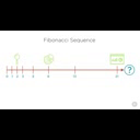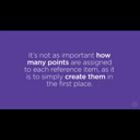For complexity points to work as an estimation scheme, each team needs to have the freedom to select reference items that make sense to them and to accept that those reference items will start to shift over time. The important takeaway here is not to get too hung up on how many complexity points to initially assign to each item that you're using for reference, because your estimation scheme will eventually diverge from other teams as time goes on. The important point is that you create those reference items in the first place so that your team has somewhere to start from.